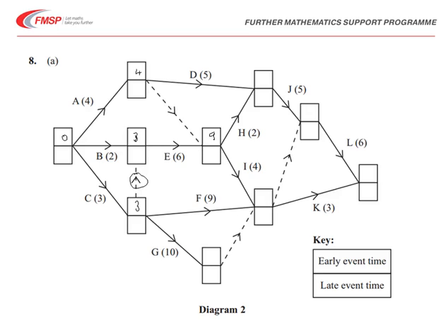And going from the event at the bottom with 3, we can work forward to the 13 at the bottom, and then keep moving forward in this way, being careful to keep track of the dummy variables. So, if we look at activity F, then we can see there we've got 3 and 9 is 12, but the dummy here would make it a greater 13, but there's also the path which comes via this point here, and that is also of length 13. So we get to here at 13.